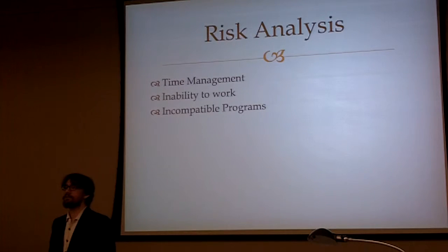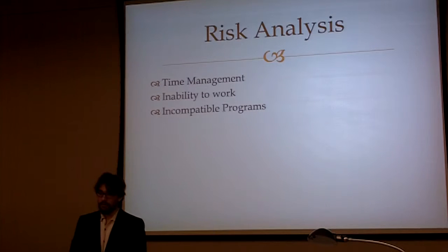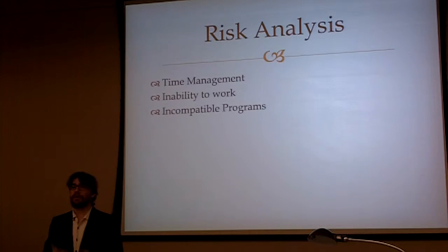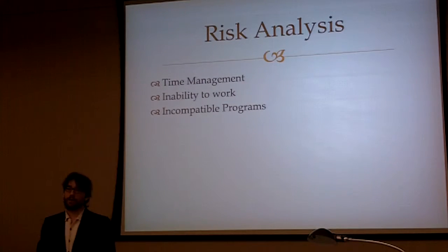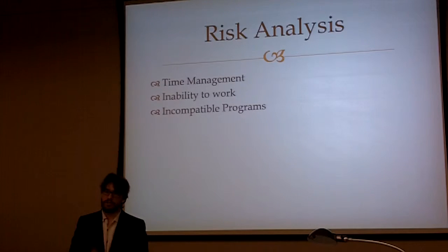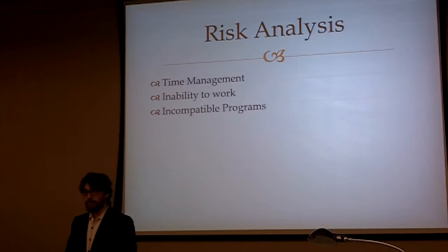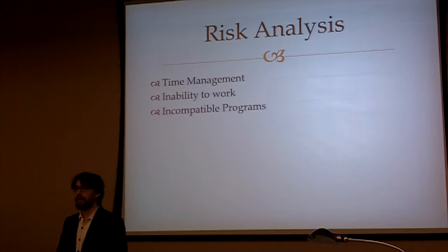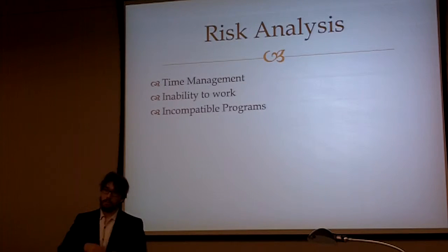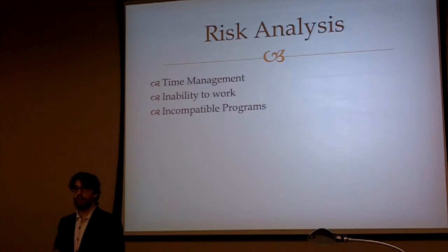Since we are working across multiple operating systems such as Windows and Mac, we expect that we'll encounter at least a few incompatibility issues. We're mitigating this by using Python coding, which works across multiple platforms. And if we do come across an incompatibility that we just cannot get around, we will alert the client to this issue, and they will determine if this incompatibility is a priority to get around, and if they determine it is a priority, we will list the requirements of getting this around and add it to the next iteration, where we will devote more time and resources to getting around this incompatibility.